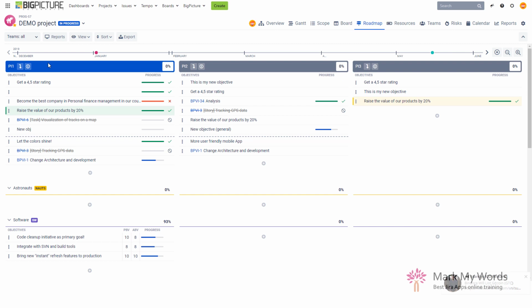And what this module allows you to do is define objectives or goals for that time period, either general goals for the whole project or goals per given team. So you can work on many different levels, either general or team-based. These goals are basically text goals. But if you don't want to use just text, you can also define those goals as Jira issues, Jira tickets. That's possible too. And then, of course, you can mark whether the goal, the objective, has been achieved or hasn't been achieved, whether it's failed or abandoned. You can also score your objectives, first as a planned business value with some numbers, then as an achieved business value, again with some numbers, to get an idea of whether you were able to meet the plans or the expectations from the beginning at the end of your time box or not.